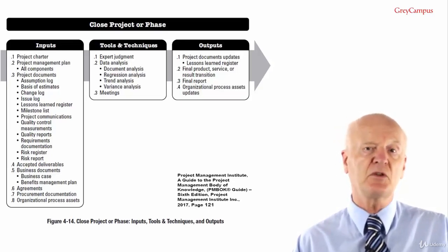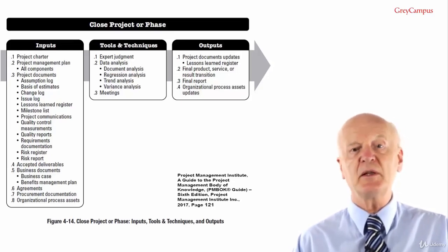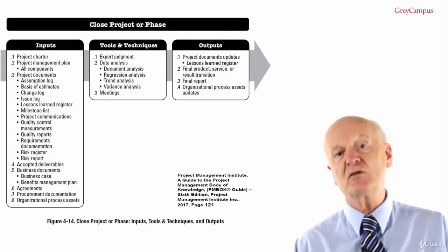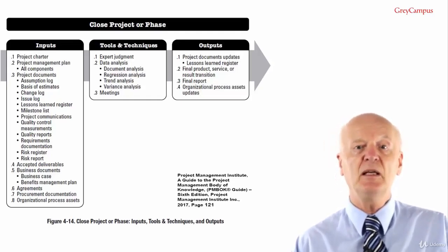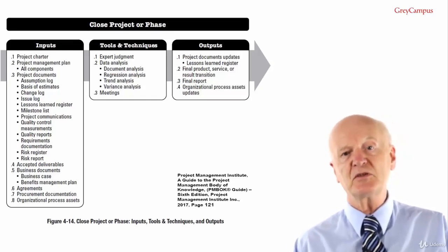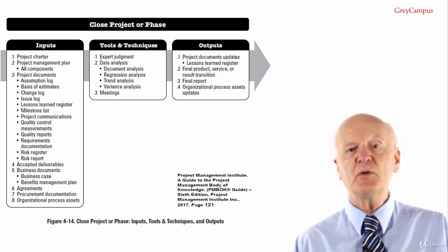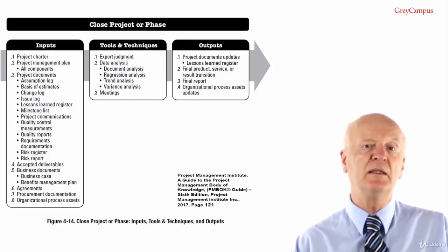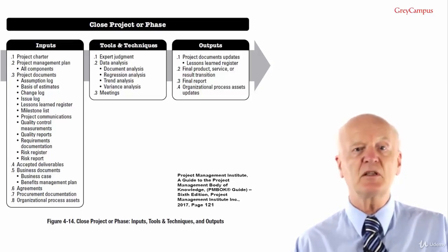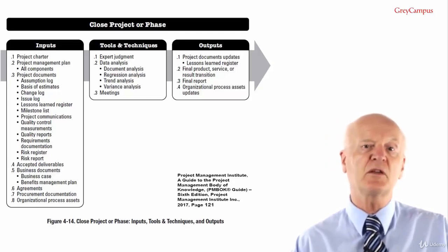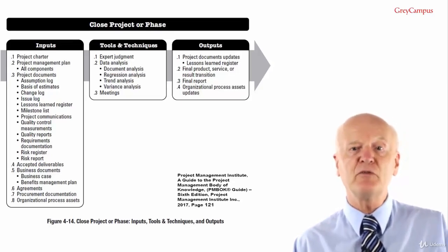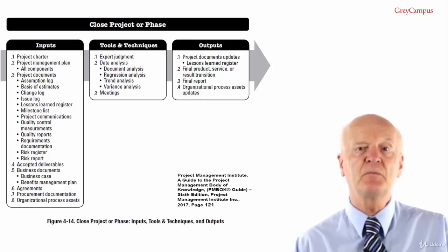Project or phase closure documents. These are formal documents and record completion of the project or phase and the transfer of the completed project or phase deliverables to others, such as the operations groups or the next phase. The project manager will review prior phase closure documentation, customer acceptance documentation from the validate scope process, and the agreements, if applicable, to ensure that all project requirements are completed prior to formalising the closure of the project.